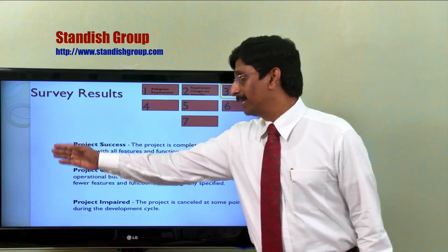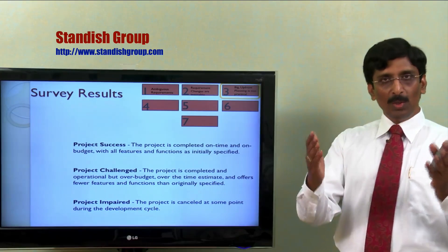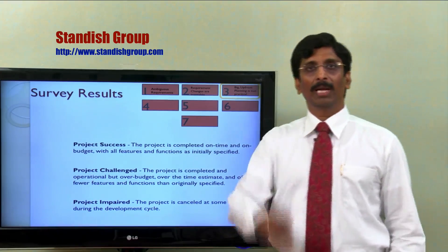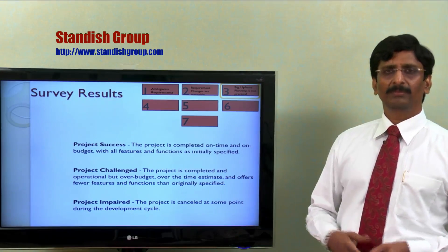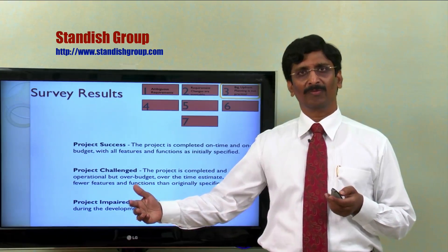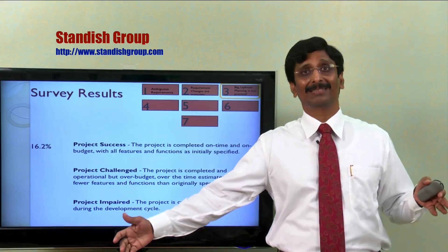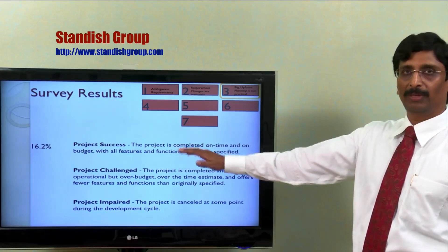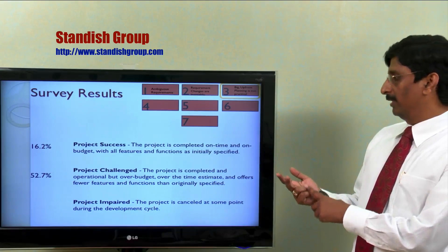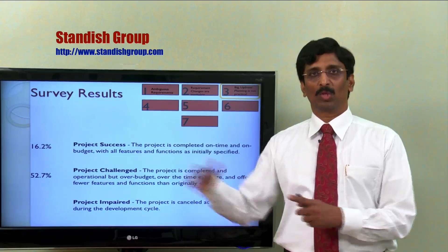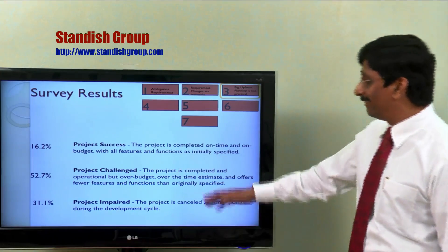Before I come up with that percentage, let me ask you: based on your experience, what percentage of projects have been successful in your company? Eighty percent? Fifty percent? Forty percent? Thirty-three percent? Let's see what the survey says: 16.2 percent, probably one-sixth of the projects. Close to 52.7 percent of the projects are challenged - delivered behind schedule with extra cost and not all the features. And 31.1 percent of the projects have never reached the customer.